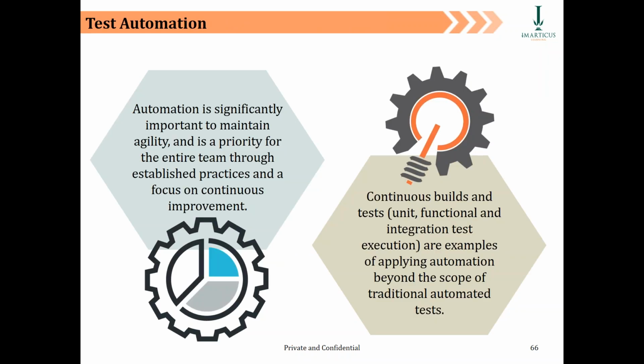Yesterday we discussed that, hey guys, Agile is great. It helps to reduce our time to market. It helps us to process, progress, construct and deploy our changes faster. Fantastic. But remember, the testing phase almost has 35% of the overall effort which you include in your project. So that is the testing part.